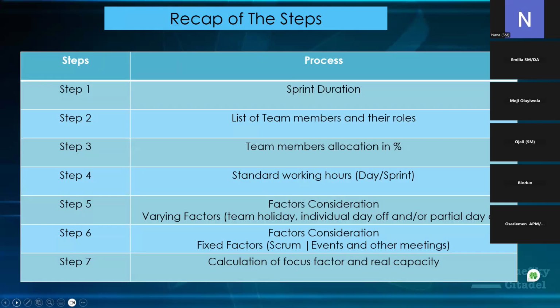Your cybersecurity person can also be seen as a developer, especially if they have one or two things to do, like I said, encryption wise or any security thing that needs to be done with what you're working on. They also need to be factored in on your capacity planning. The only people that won't be there will be you, the ADM, the Scrum Master, and the BA. Please note that your capacity planning is not a timesheet for the organization. That's where you would come in. That's where everybody would come in.